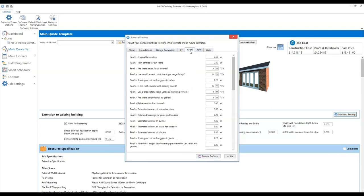If you look at roofs, you'll see the standard settings for truss roof rafter centres, joist centres for cut roofs, whether there are eaves fascia boards, sarking boards — if you're working north of the border you might want to switch that to yes — barge boards to gables, rafter centres for cut roofs and so on. These are all set to sensible default settings, but it might be that you work slightly differently. If that's the case, tweak any of these dimensions here and click save defaults. The point of having these standard settings is that if you're estimating a more complex roof with multiple sections, the settings you choose here will filter down into each of those different sections, so you don't have to go into different sections and make those changes multiple times.